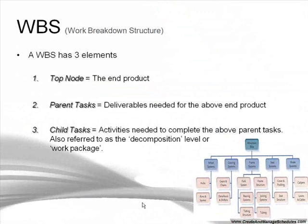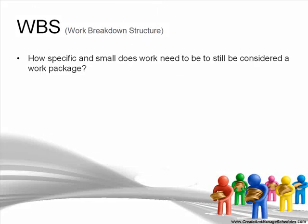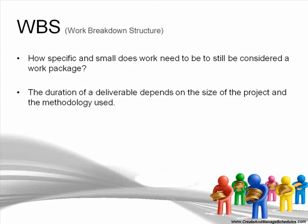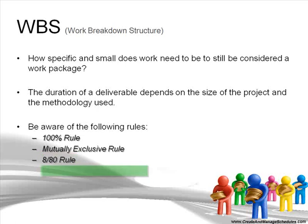This is referred to as the decomposition level or work package. How specific and small does work need to be to still be considered a work package? The duration of deliverables depends on the size of the project and the methodology used. Be aware of the following rules: the 100% rule, the mutually exclusive rule, the 8/80 rule, and in general, learn your methodology rules.